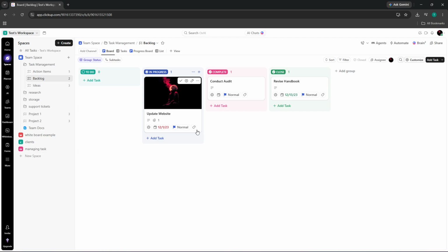During regular planning sessions, review the top of the list with your team and move the highest priority, fully defined items into an active sprint or work list. This grooming habit, even 30 minutes a week, is what keeps the backlog a living tool rather than a graveyard of forgotten ideas. Archive outdated or rejected tasks rather than deleting them. Archiving preserves the context of why something was considered and set aside, without cluttering your active view.